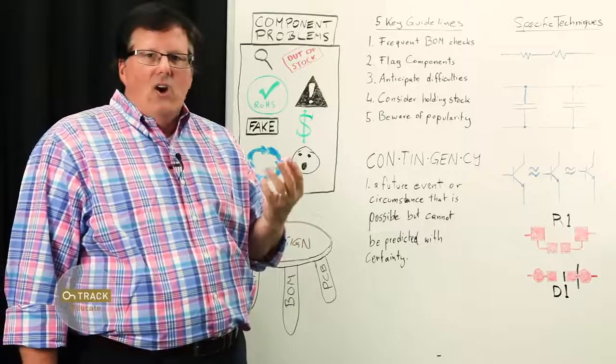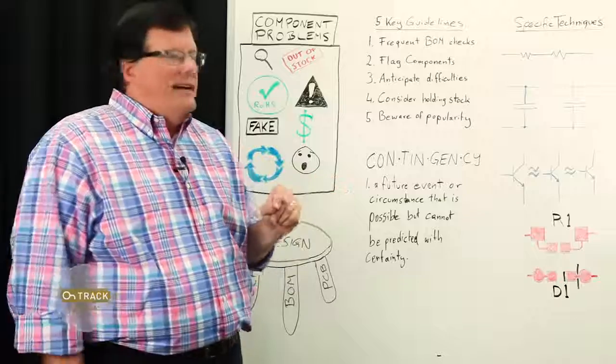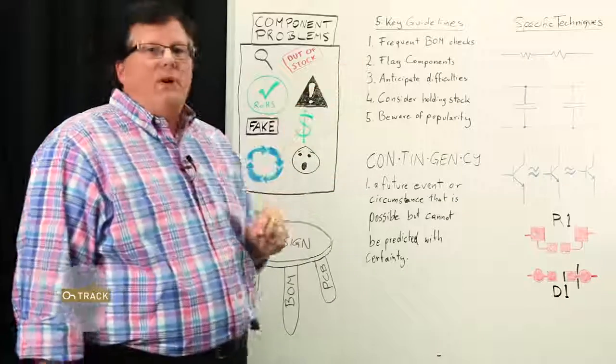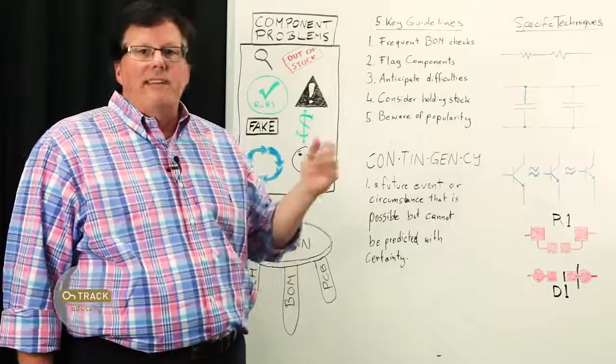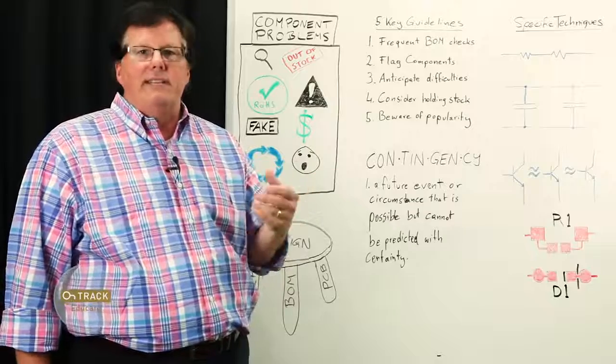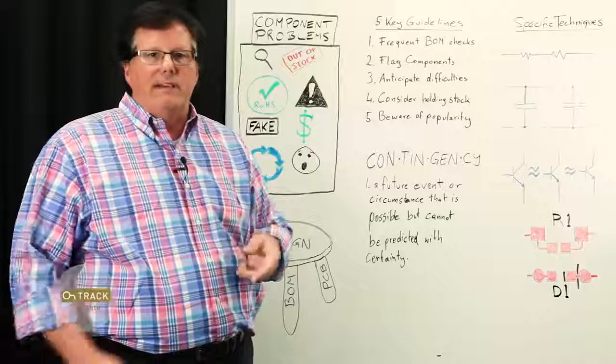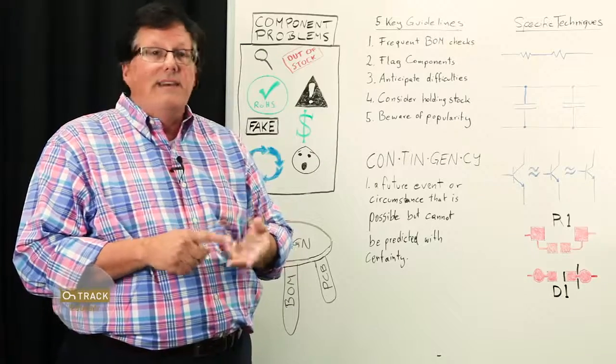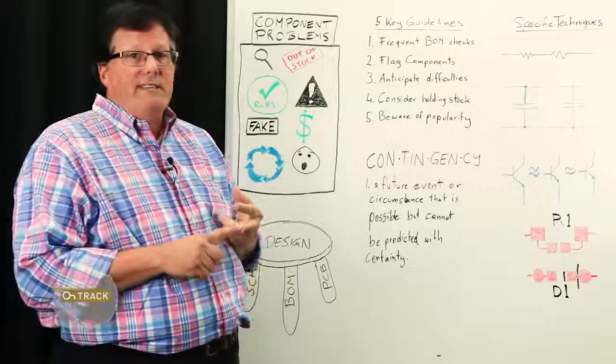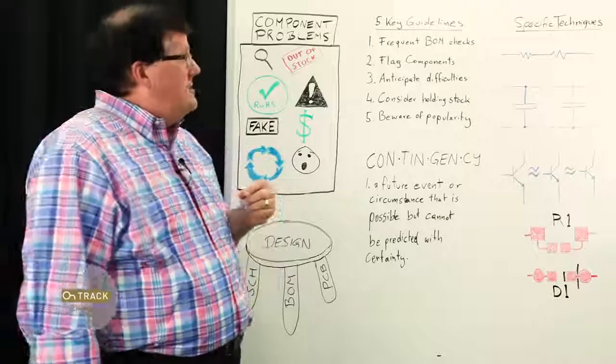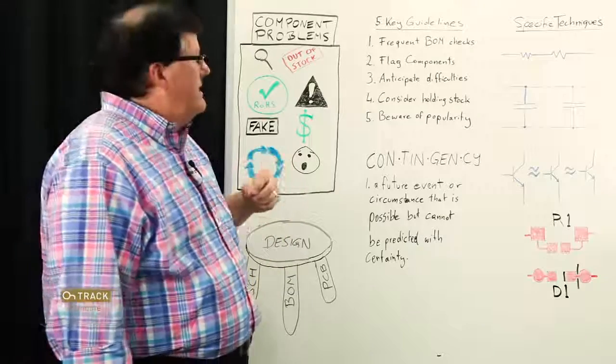Component supplies are fluctuating, just like airline tickets. Flag components that are risky. Better yet, use an automated tool that can get that data for you, so that you're not designing unknowingly with something that's near its end of life, not recommended for new designs, or is only supported by a few suppliers. There's no second-source ability.